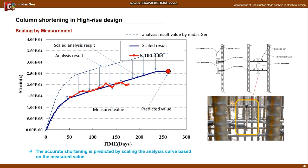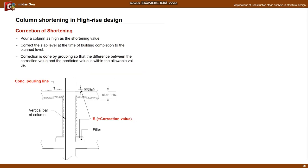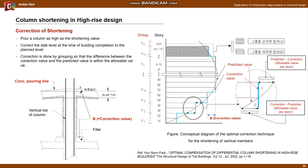The picture on the right shows the strain gauge installation. Next is how to do the correction. The column is poured as high as the shortening so that the slab level at construction completion matches the planned level. Correction is done by grouping so that the difference between the correction value and the predicted value is within the allowable value. In general, correction is performed in groups of two or three stories.